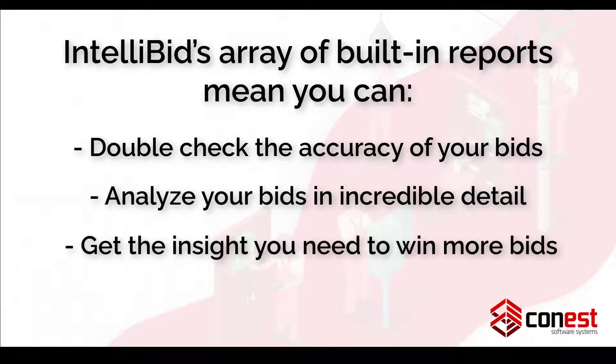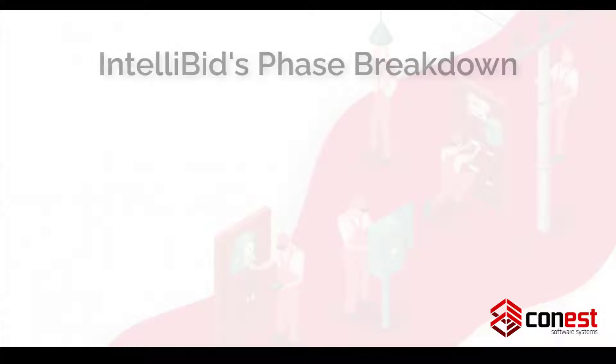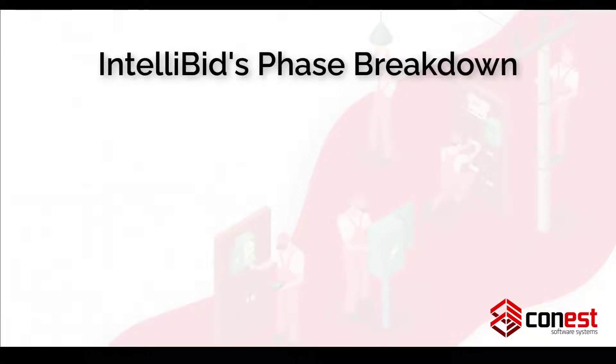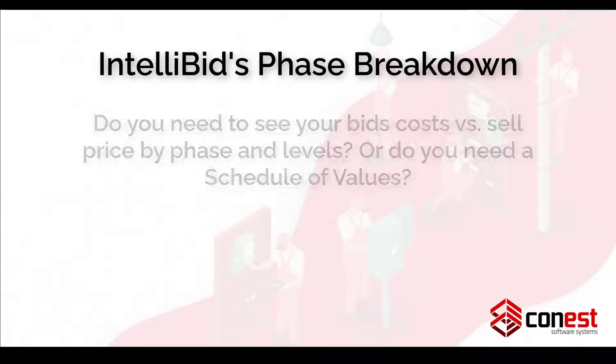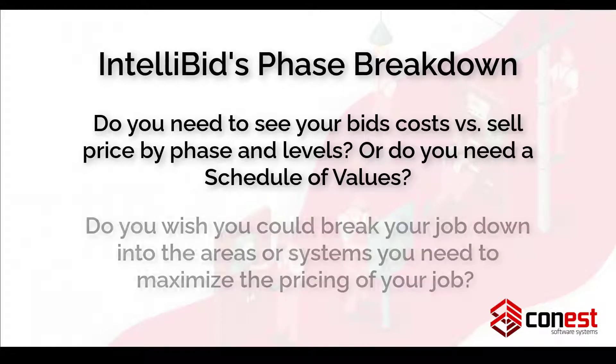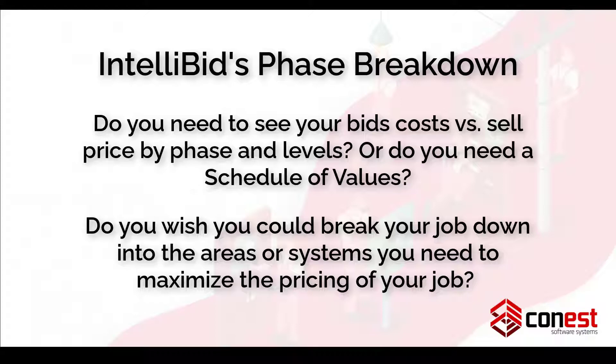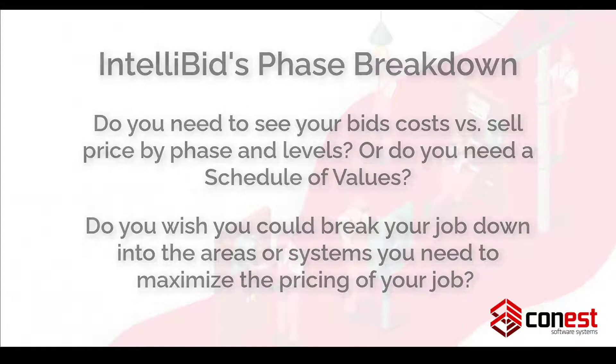Feature number three, IntelliBid's phase breakdown. Do you need to see your bid's cost versus sell price by phase and levels? Or do you need a schedule of values? Do you wish you could break down your job into the areas or systems you need to maximize the pricing of your job? Well, IntelliBid's job phase breakdown structure lets you do just that.